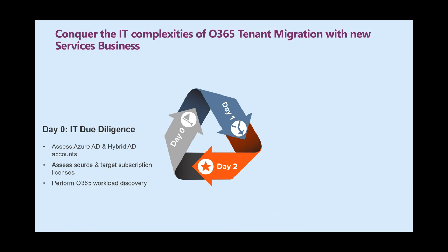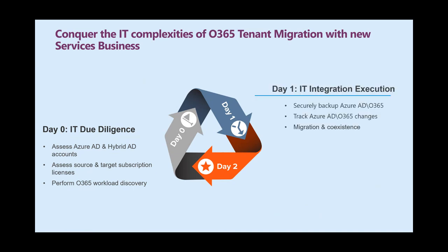And then also do a workload discovery to have a very crystal clear understanding about your workloads, your content sizes, your content types, your content masses, and the complexity of your content, because that's going to be asked when you kick off the migration. And if you don't have an overview about the workloads and content, you will run into issues, because it's a black box. And here it's all about getting transparency.